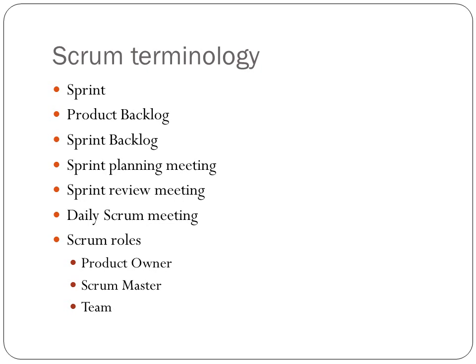In sprint planning meeting, all the stakeholders meet to commit on the particular requirement for the current sprint. Stakeholders include business people, technical people, finance people and marketing people, etc. Then comes sprint review meeting. In sprint review meeting, usually they will be giving the demos on project features and also they will conduct some retrospective meetings on the sprint adjustments.